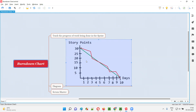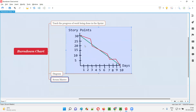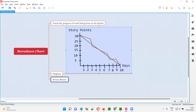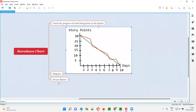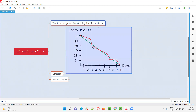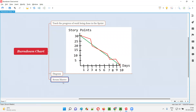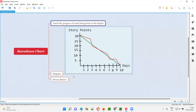With this burn down chart, the scrum master is the main person who will use it. The scrum master takes care of the burn down chart to track the progress of work — on a particular day, what is the status, how much work is completed, and how much work is expected to be completed.